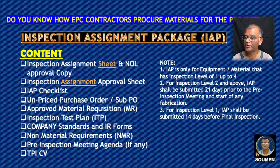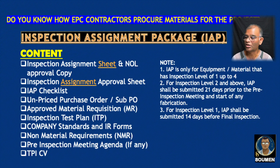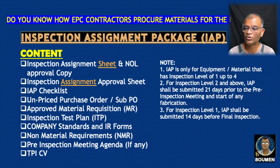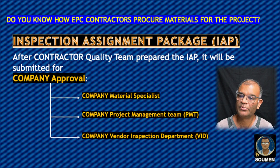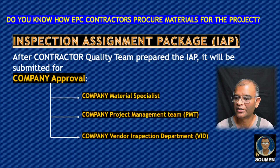Some important notes: IAP is only for equipment or material with inspection level 1 through 4. For inspection Level 2 and above, the IAP shall be submitted 21 days prior to the pre-inspection meeting and the start of any fabrication. For inspection Level 1, IAP shall be submitted 14 days before final inspection. The IAP always goes through company approval similarly to the MR: first to company material specialist, then PMT, then to the vendor, and final approval comes from the Vendor Inspection Department (VID).